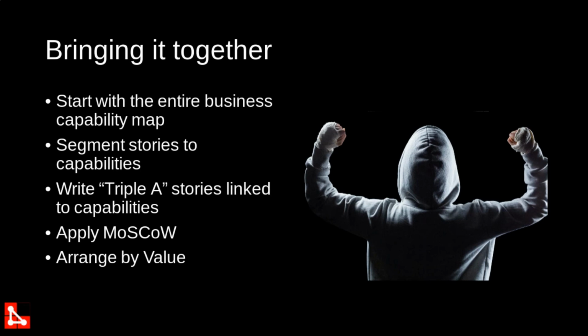All right. Does this make sense? Yeah? All right. Now, finally, apply the MoSCoW. You all remember what the MoSCoW stood for? Again, feel free to type that into the questions or into the notes in the handouts. It stands for must have, should have, could have, and won't have. A very good way to look at your project is to fill it with 65% of effort on the must-have requirements, and then the remainder on the should-have and could-have. Typically, I would say 25% on the should-have and then 10% on the could-have requirements.